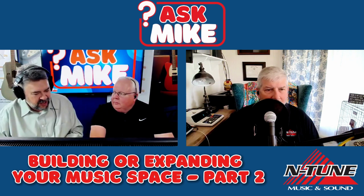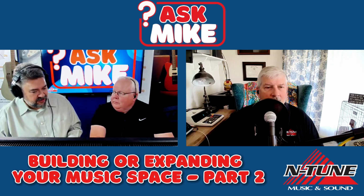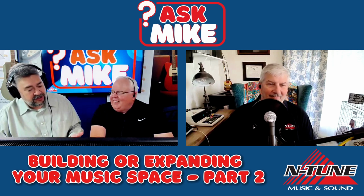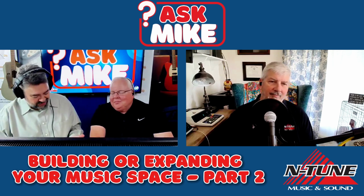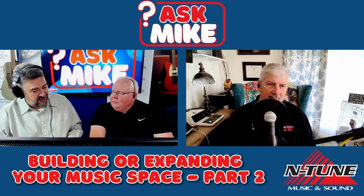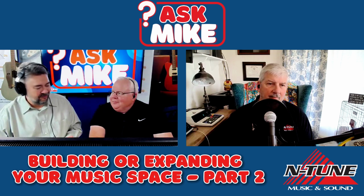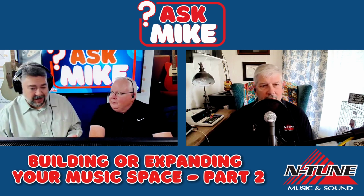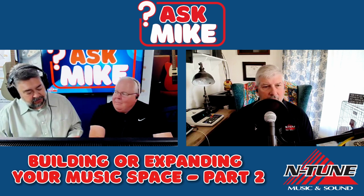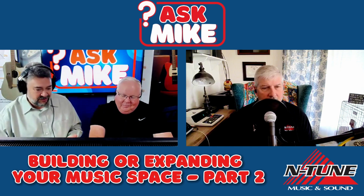Anything you have that's a change, after the construction's approved and started, is called a change order. And change orders are very expensive. Yeah, equals money. The architect gets their cut for new drawings. The general contractor gets their cut. Then the subs get their cut. And then the materials. And then what do you do with the old stuff, and what will it take to modify the space? So we might have to cut into that cinder block, and there might be asbestos in there if it's old construction.